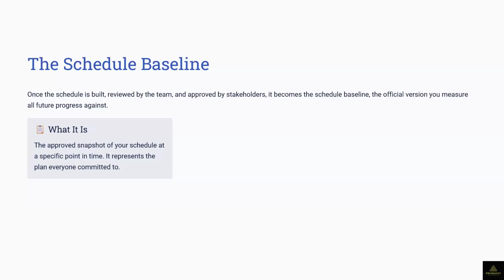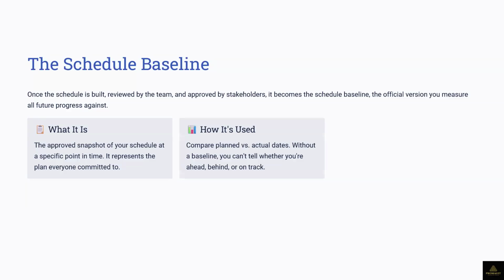So you rebaseline. It could be that something was removed. And if something was removed, automatically I expect you to finish faster. That's the expectation. It might not be so, especially if the activity is something that is running parallel with other activities. You have to really check your schedule. Okay, removing or adding, how does it affect things? So you reset your baseline. Those are the things you do in your Microsoft Project also.